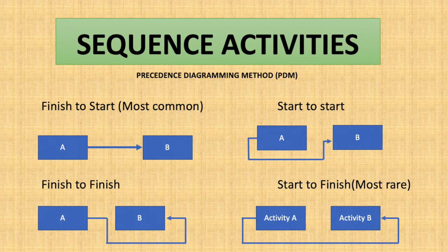Okay, next is finish to finish. In this type of relationship, a predecessor activity cannot finish until a successor activity is completed. Say you need to submit documents for a new project you have been awarded. To complete that documentation, some documents you can do internally, but you need an inspection company to provide you with a letter.